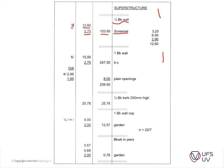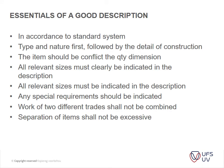With new measurement systems, you can take quantities directly from your drawing into your bill of quantities and the program does the grouping. The essentials of a good description are very important — this is what you'll get involved in on your projects. In accordance with the standard system, for instance, if you measure brickwork, any opening less than 0.5 square meters is not deducted from your measurement. Anything above that should be deducted. So a small window is not deducted, but doors must be subtracted as they exceed 0.5 square meters.